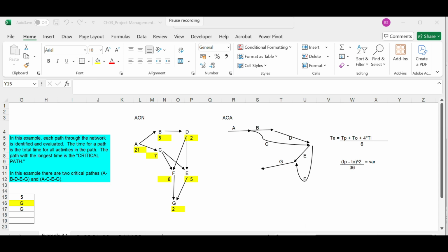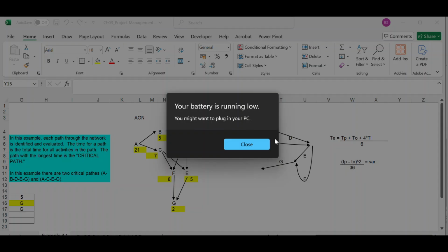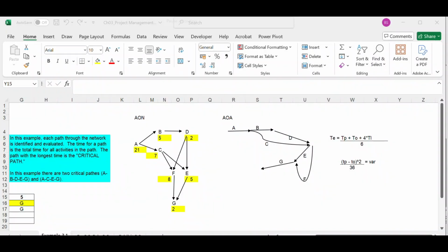There are some laws that govern this estimation process. The first one is called Parkinson's law. It says that work expands to make use of all the time available. This means that work will not complete before time, because even if the work completes before time, it won't be reported. There is a tendency that once you report that the work is completed before time, the next estimate will be planned according to that. The next estimate will plan that the activity will take even less time.